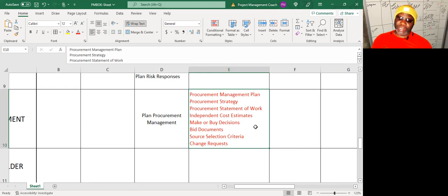If she's telling me, yeah, it should be around the region of 12, then okay, good. But if you say, no, you're right, Phil, it should be in the region of 5 or 6 at most, then I need to understand, okay, where did Firuz get it wrong? Where is she seeing the scope of work differently? So it's just an independent estimate from a third party.